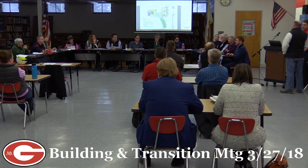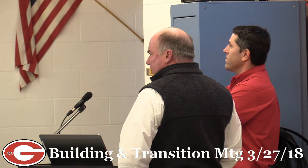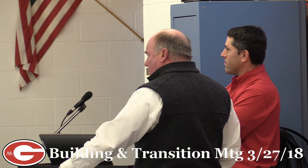I would just reiterate the same. I think you have to look at what are the major elements of a building when you're trying to progress a schedule forward. We're right now looking, for the most part, at drywall being about 85% to 90% complete. After you've closed in your walls, you're ready to start putting the floor in your ceiling. I'm sorry, can you come up again? I normally just introduce you, Trip Elmore from Dorn Whittier. Thank you.